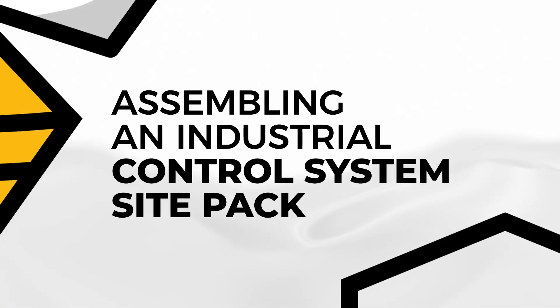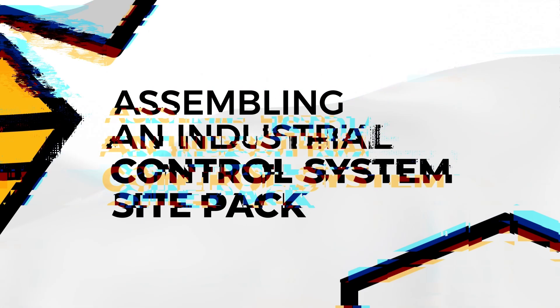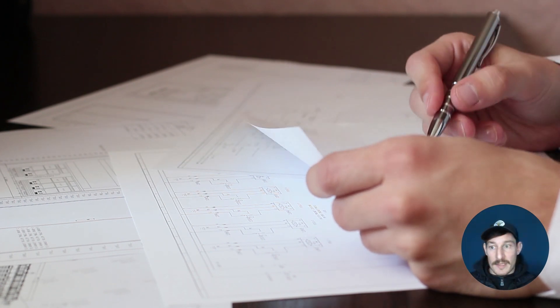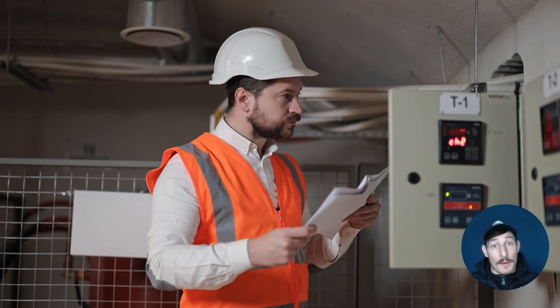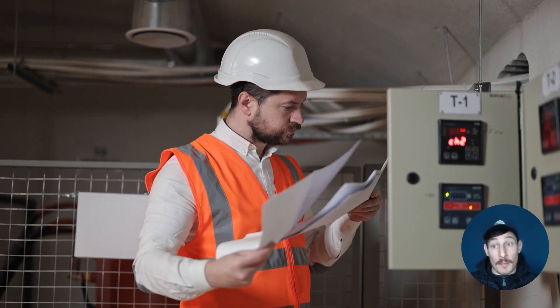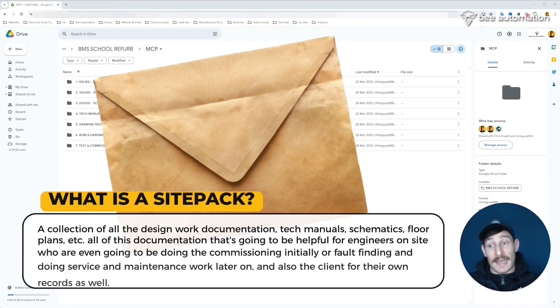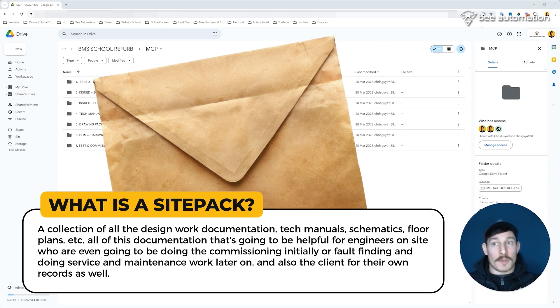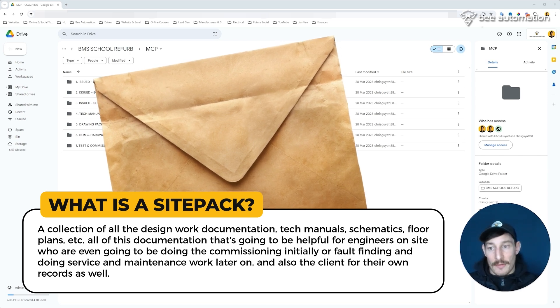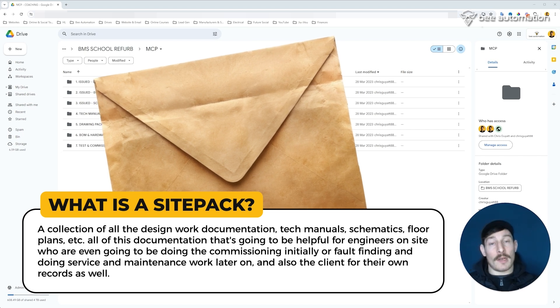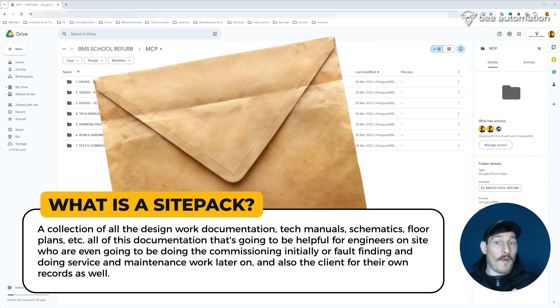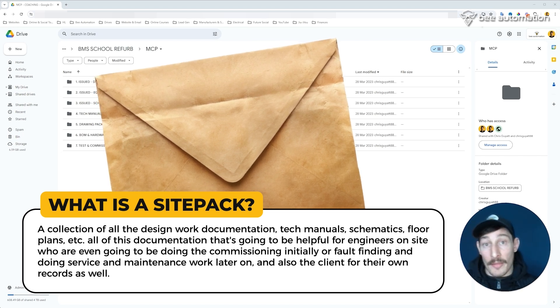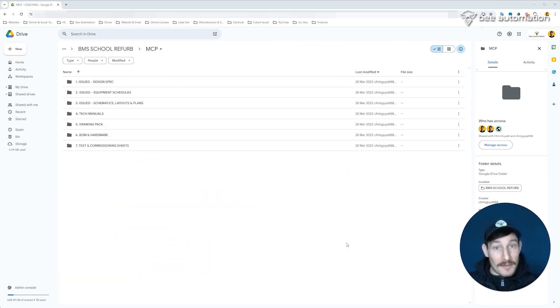In this video we're going to go into that. Okay guys, so now the final thing is to put together a site pack and print it out and create a digital copy. What's included in the pack will depend really on your own preferences or what the site requires, but what I would include in my site pack - and first of all, before we get into that, what do I mean by a site pack? Basically, a collection of all the design work, documentation, tech manuals, schematics, floor plans, etc. All of this documentation that's going to be helpful for engineers on site who are either going to be doing the commissioning initially or fault finding and doing service and maintenance work later on, and also the client for their own records as well.